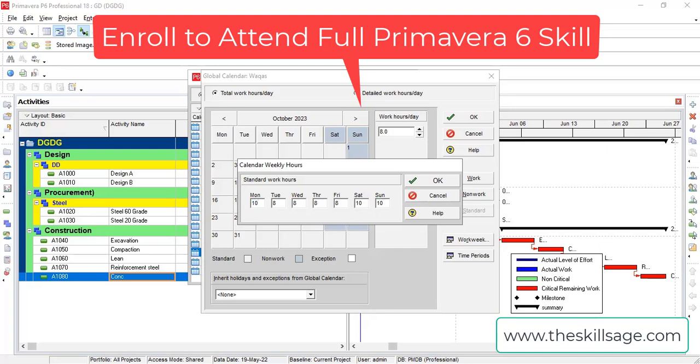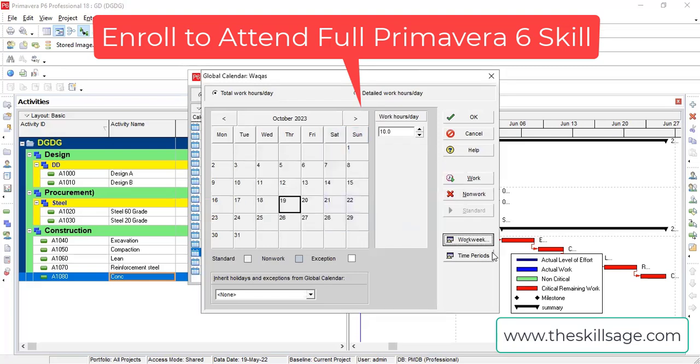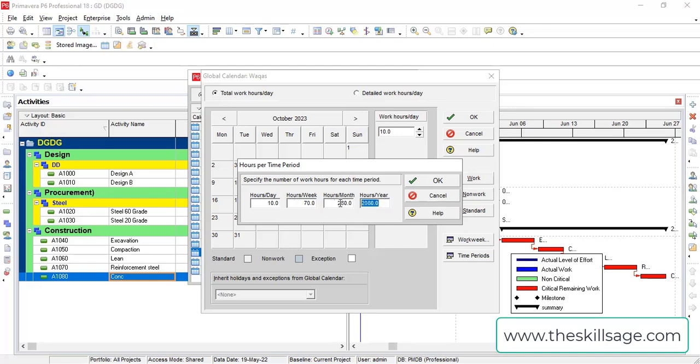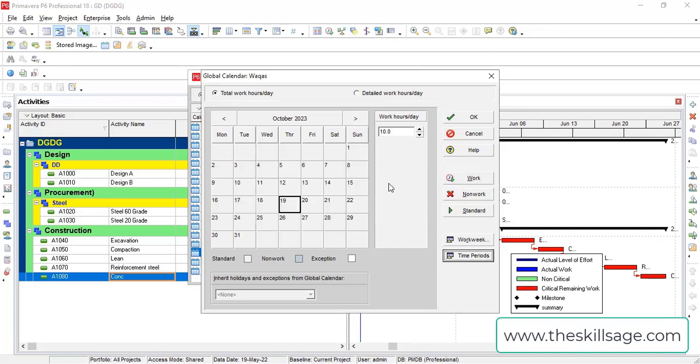Saturday throughout the week 10 hours, and here 10 hours. This is my one week pattern. I am going to create two different calendars and want to analyze how it is going to impact on our project scheduling. There is 10 hours throughout our week, there is no off day. Then time periods: there is 10 hours per day working, there is 70 hours per week (7 multiply 10), then there is 280 (four weeks in one month), and then there are 12 months, so multiply 280 is 3360.